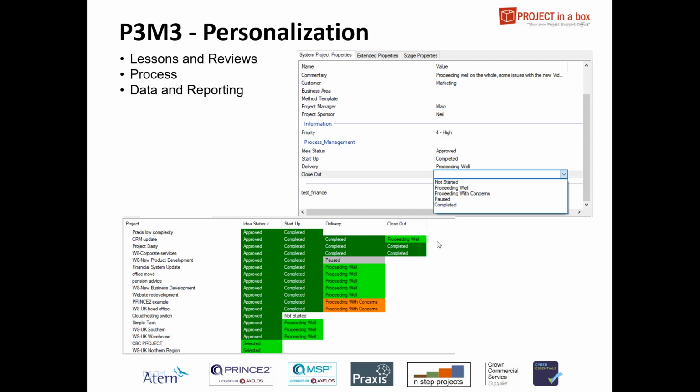So the system can assemble a portfolio for you automatically of all the projects in a particular department. Now, if that department is a figure that you type in, and somebody puts A&E and somebody else puts accident and emergency, they won't group together. So having this sort of better structure, pick listing things, means that works much better. So you can produce rules around all that sort of stuff, which drive that assembly of things.